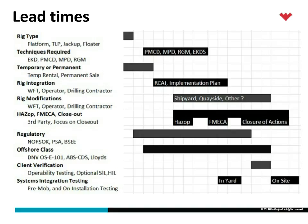We have to assume that they want to maintain class and that all the equipment we build and install — whether temporary or permanent — has to meet the same standards. That's not just about having good equipment that we pressure test regularly; it's having fully documented equipment, knowing where it came from, having all the quality documentation from the build, testing, engineering, and verification, all the factory acceptance testing, everything required to demonstrate that the equipment is safe, well engineered, and fit for purpose.